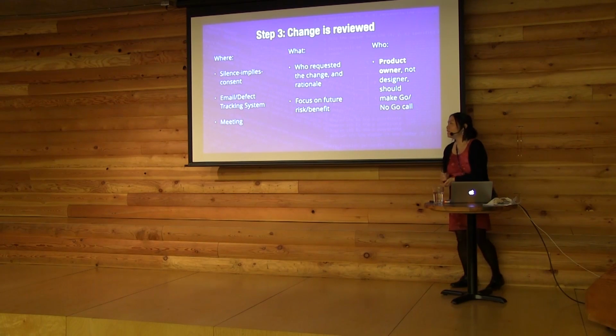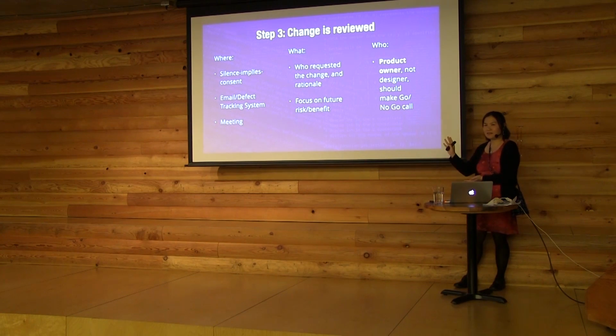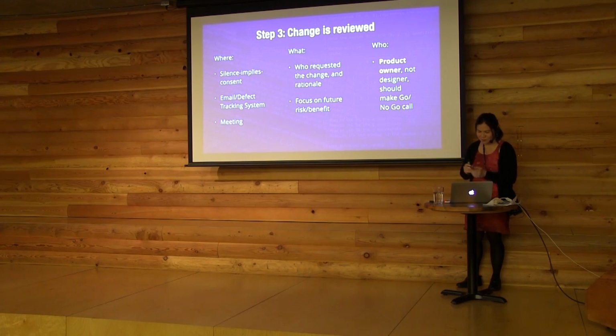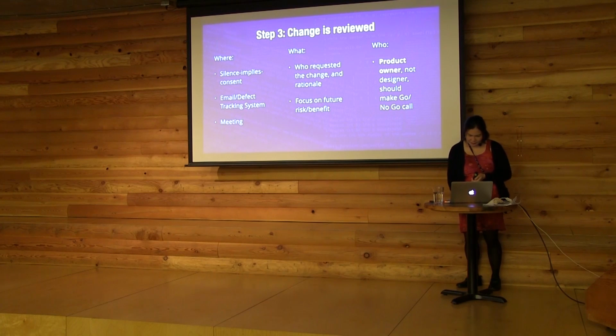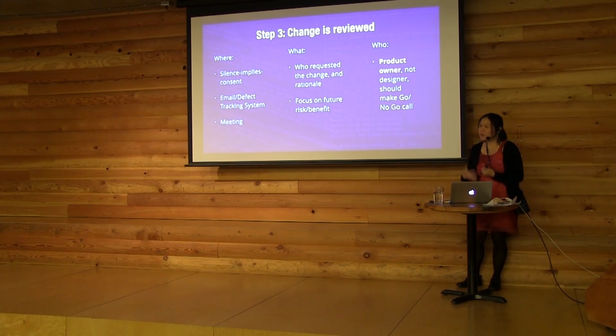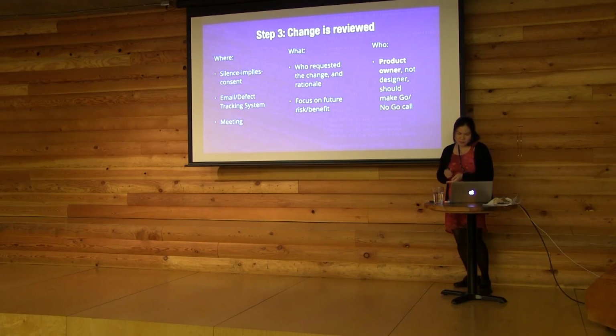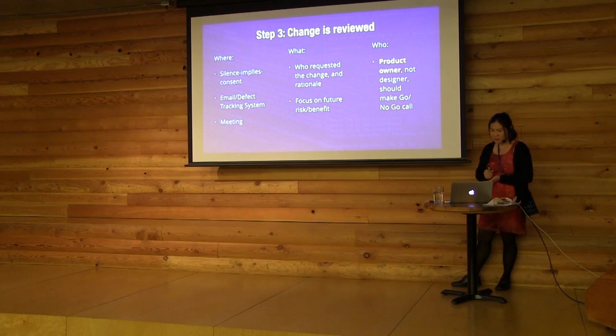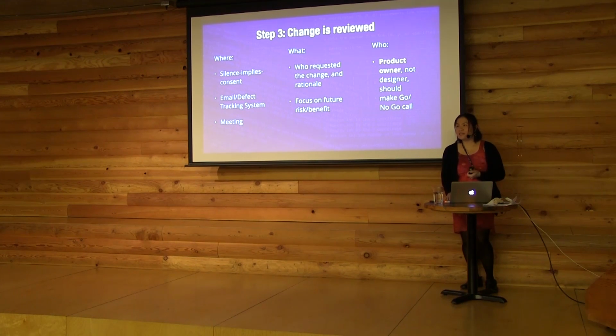So you want to get this off the designer's responsibility. The designer's just the messenger. Make sure that it's the product owner saying, this is what we're going to do, as opposed to the designer saying, please, please, please do this. So I would recommend that formality, especially in big teams, especially in longer release cycles, and especially if you've got a product that needs something like translation or outsourcing, where you need that intensive communication. Or in a team where there's a history of conflict over change in the past.